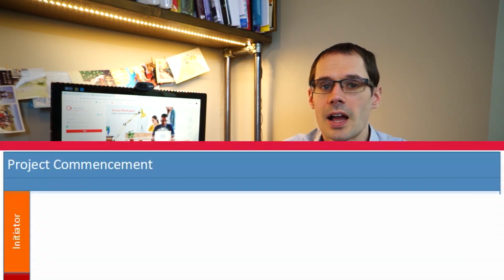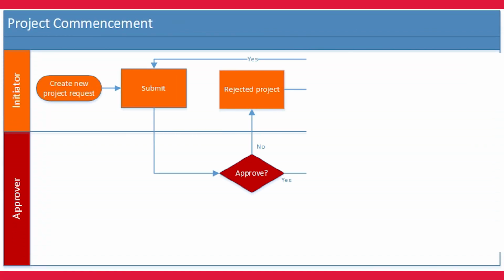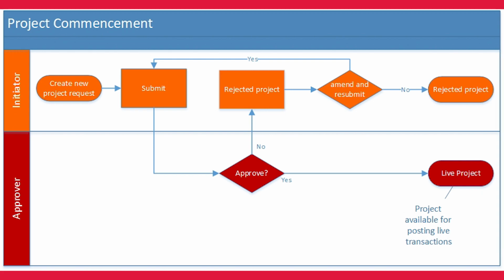However, a lot of our customers are looking for us to put more of a process around project commencement. So a non-finance user might want a new project, and that non-finance user will fill in a form inside the system, and after filling in that form, will send that form off through an approval workflow before the project is created, and until it's created, nobody can post transactions to the project. And that kind of control around project management and project costing is obviously important to a lot of customers.